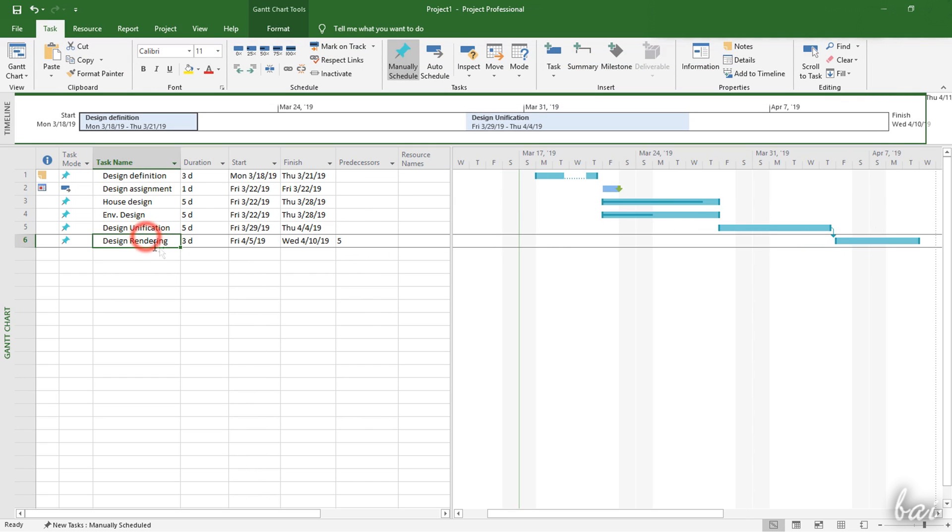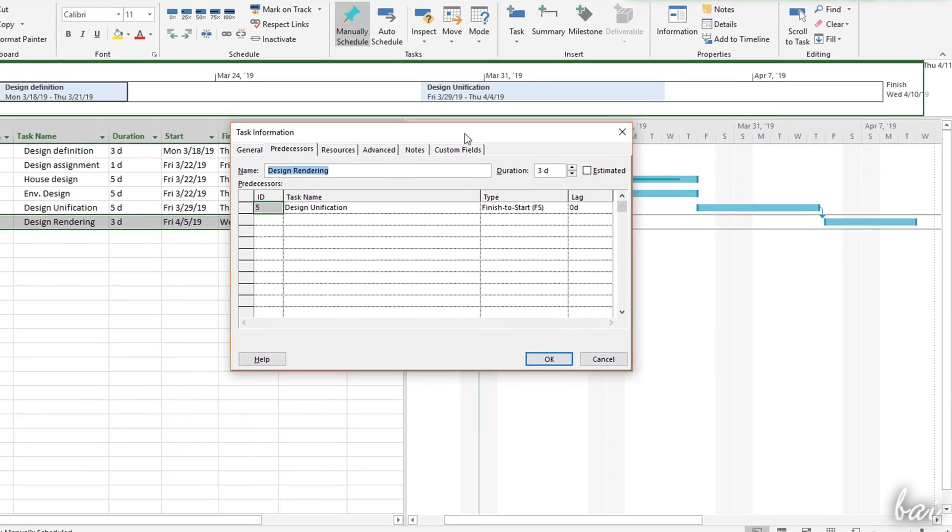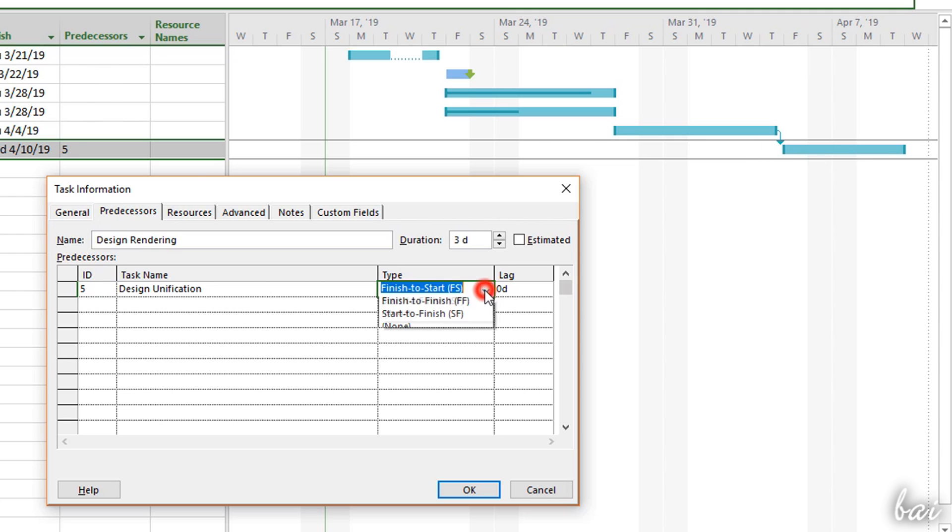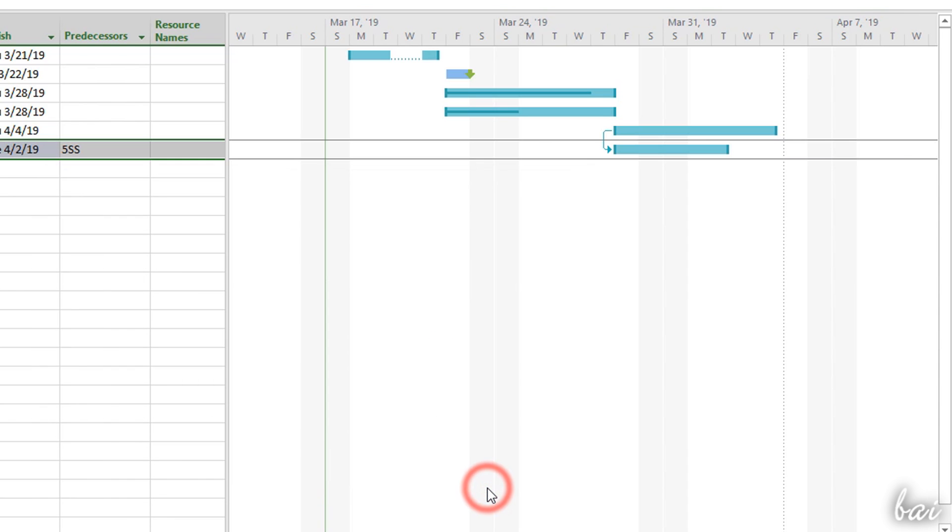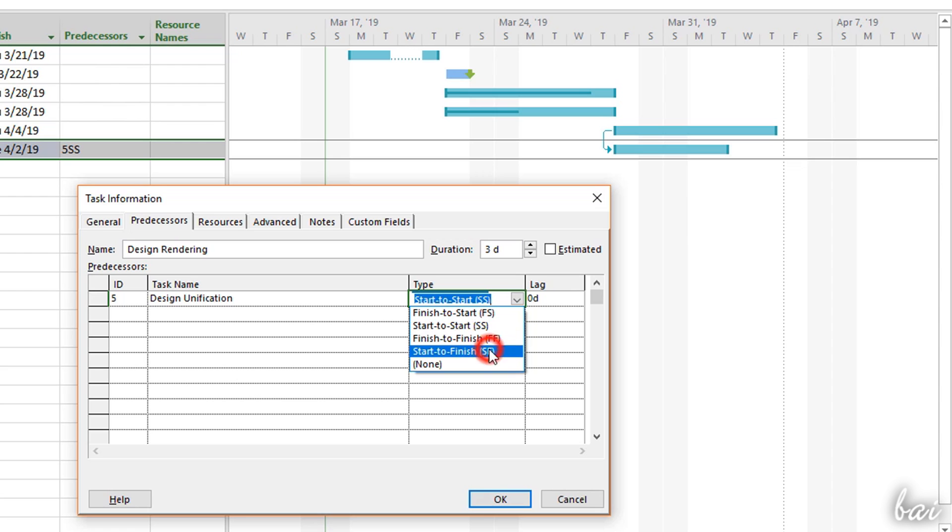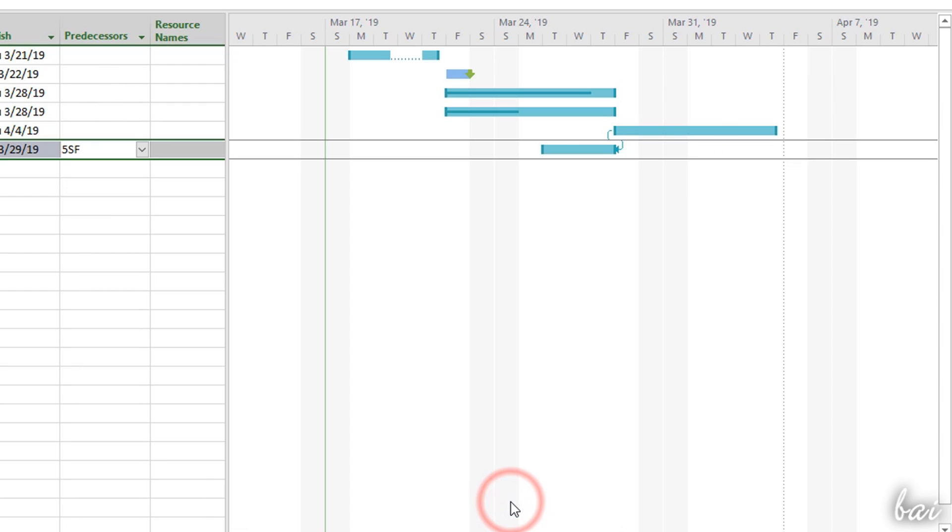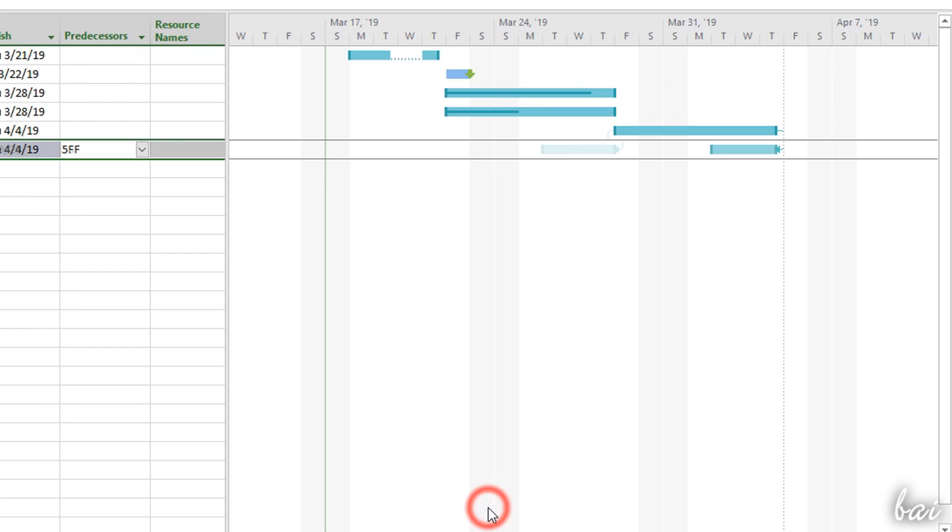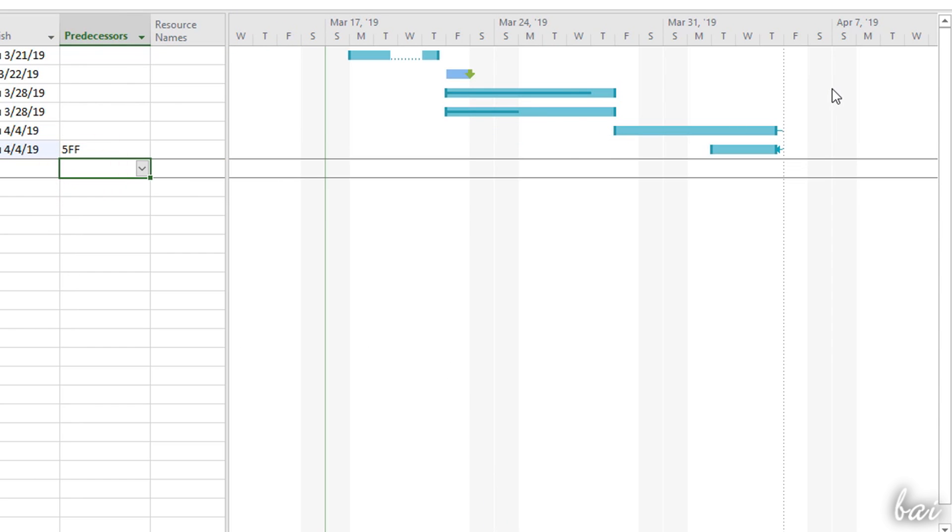All the predecessors of any task are listed under the Predecessors column with their row number. To manage links between the task and its predecessors, you can open the Task Information panel under the Predecessors tab. Each link is shown with the predecessor row number, its name, and the kind of dependence. Finish to Start is the default kind of link, but you can also choose Start to Start to start the current task when its predecessor starts, Start to Finish to begin the current task when its predecessor ends, and Finish to Finish to end the current task when the predecessor finishes.